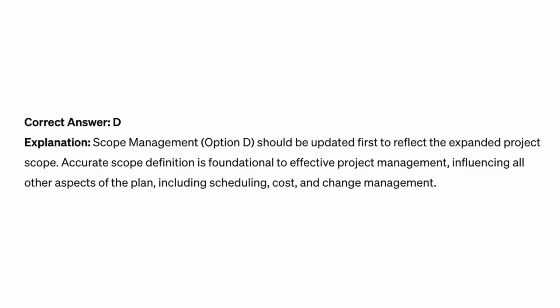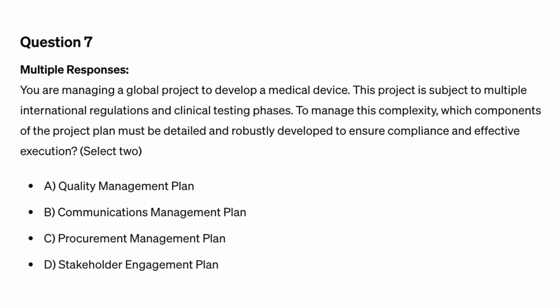Correct answer D. Explanation: scope management, option D, should be updated first to reflect the expanded project scope. Accurate scope definition is foundational to effective project management, influencing all other aspects of the plan, including scheduling, cost, and change management.